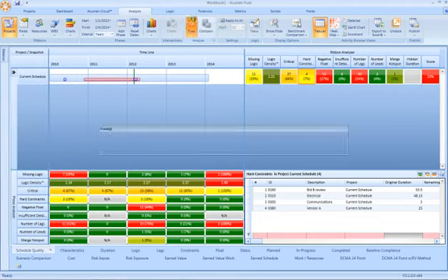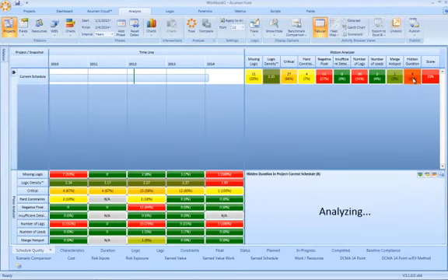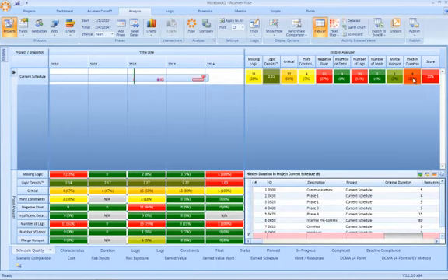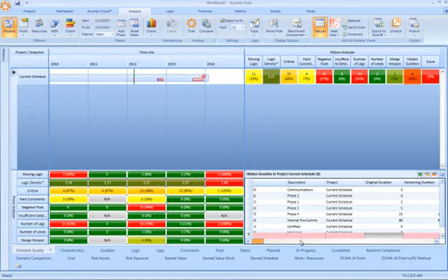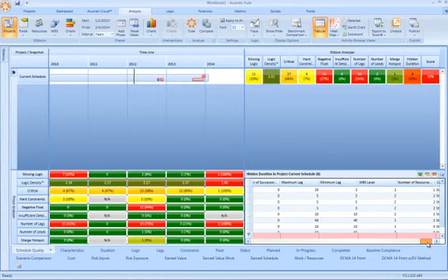So hidden duration is a ratio between the duration on relationships and the duration on activities. And in simple terms, if the relationship duration is greater than 35% of the activity duration, then it gets flagged as an exception. So in our example project here, we have eight activities where the duration on the relationship is greater than 35% of the duration on the activity. And if we take a look at the durations on the lags themselves, you can see here some very large durations relative to the duration on the activity.